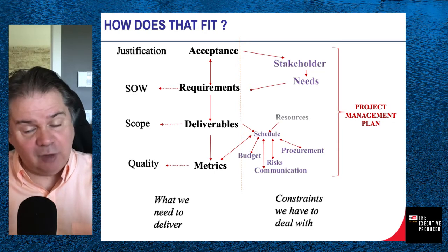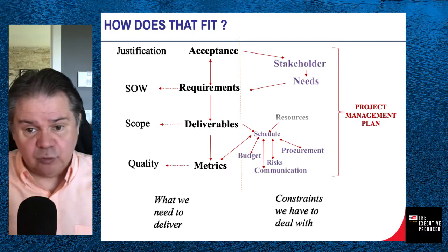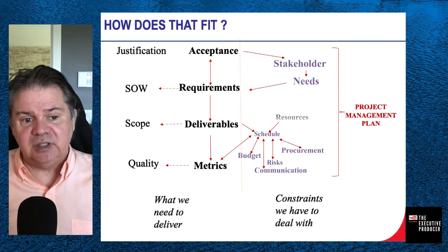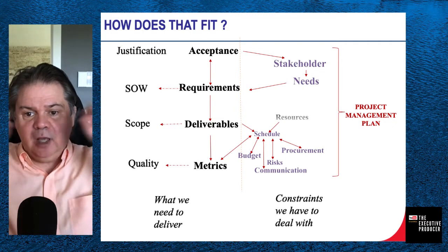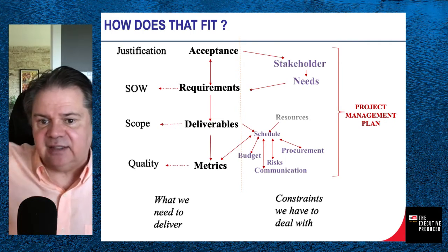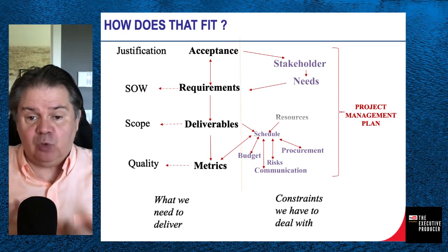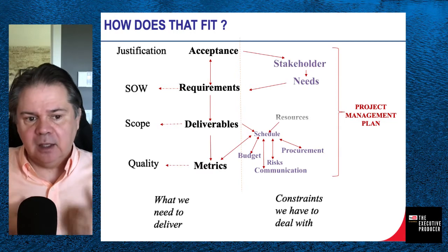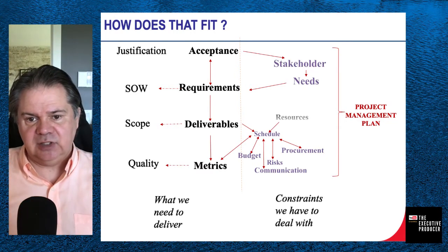Needs to have all these activities, and on a quality control plan, there's a lot of activities and a different resource that needs to be allocated into this. So that first integration, which is opening up the schedule, adding these activities, reallocating the resource, reaffecting your budget, because quality takes time, costs money. So all of this is the first time you're coming back at this schedule.